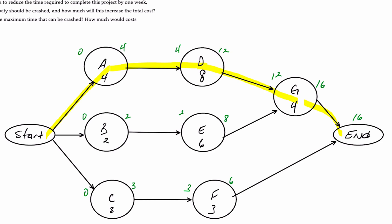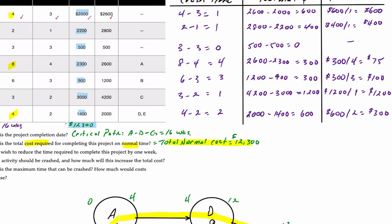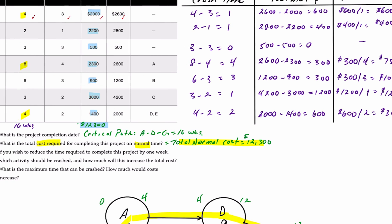The next question asks for the total cost required to complete the project in normal time. That's simply the sum of all the normal costs, which add up to $12,300, as identified in blue.